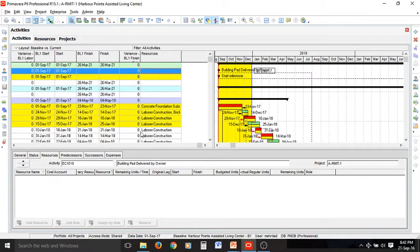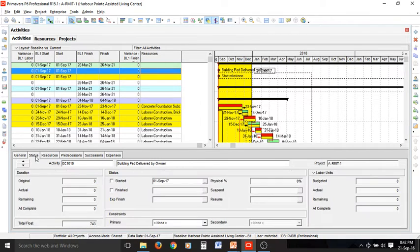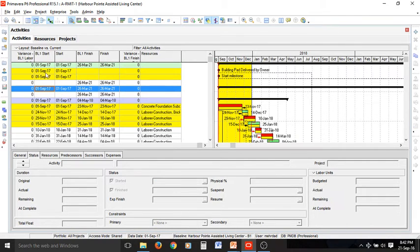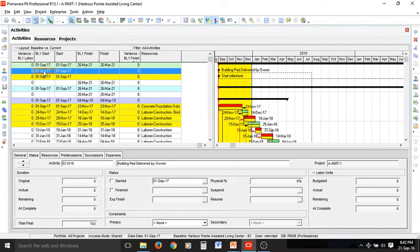We need to go to the status tab in the details layout to define start status and finish for different activities. I will start by selecting the first yellow highlighted activity, which is a milestone. If I check the started box, the finish box is automatically selected because the duration is zero for every milestone.